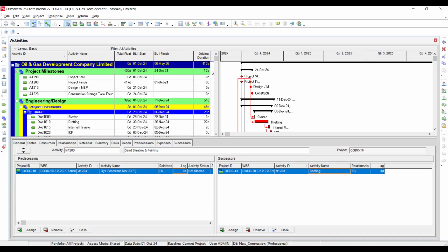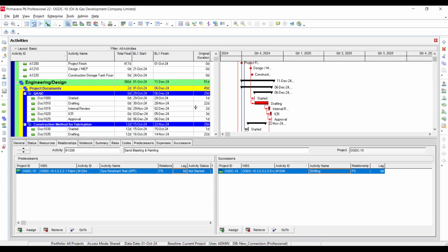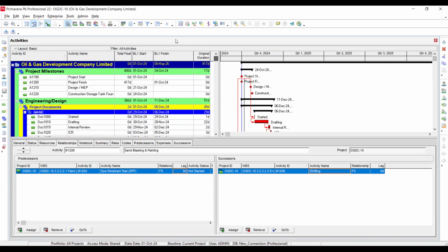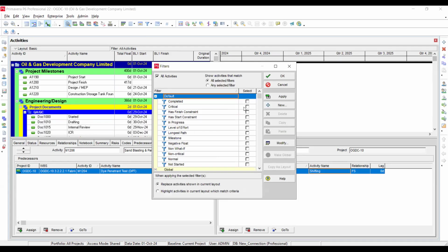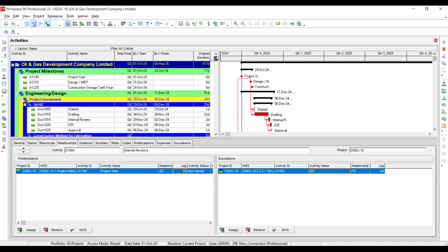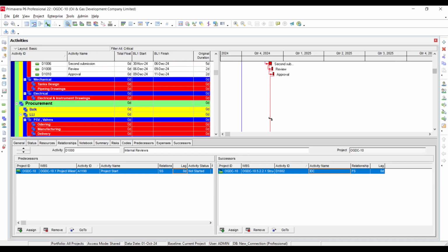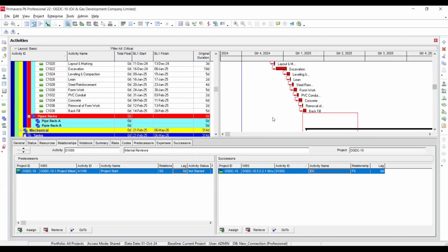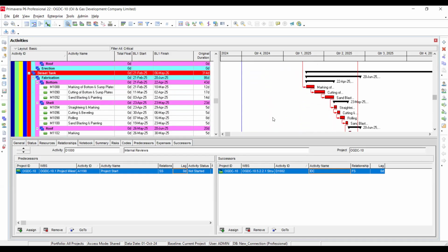So you have 35 plus 17, 52 days. You have to make the schedule, you have to filter out what is my critical path method. This is your critical path. It is going to give you the critical path only, because if you are going to reduce your duration on the critical path, that is going to reduce your project duration. I need to make it 365 days. So this is the only critical path over here. I just want to see, if I want to make it 10.